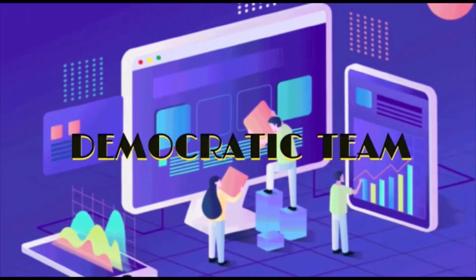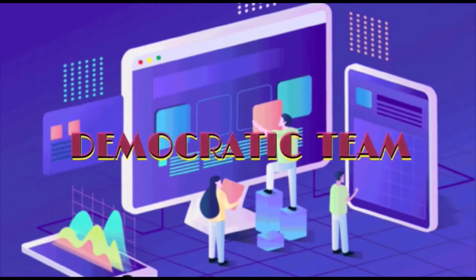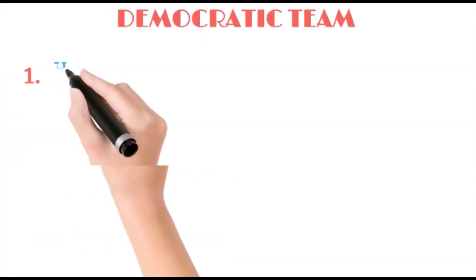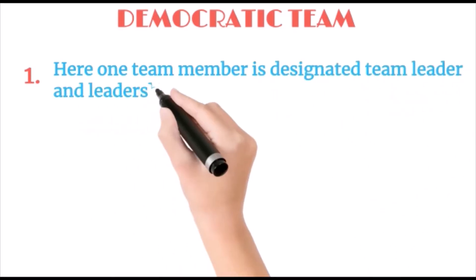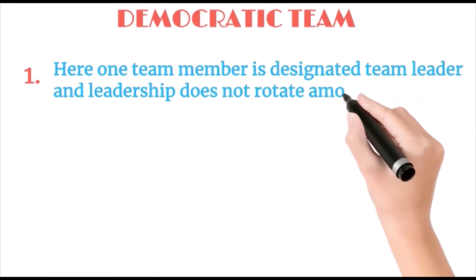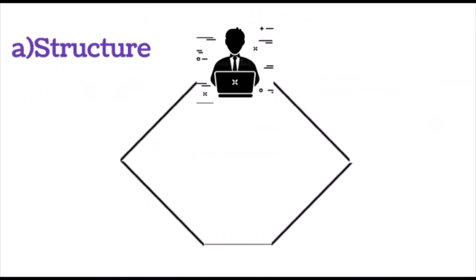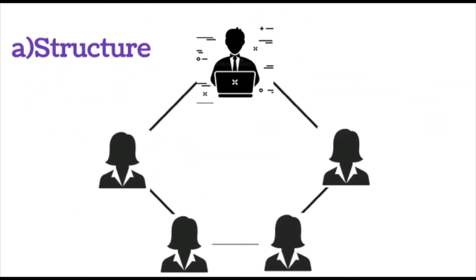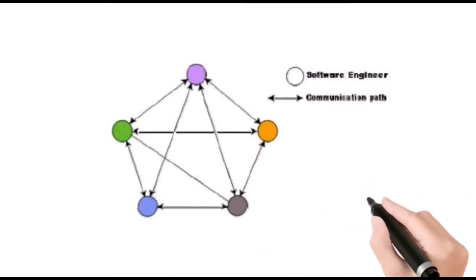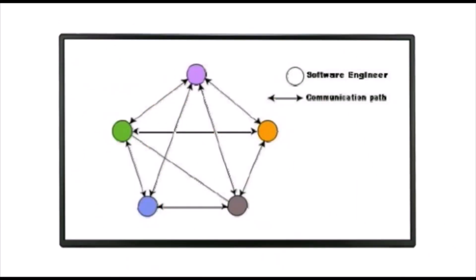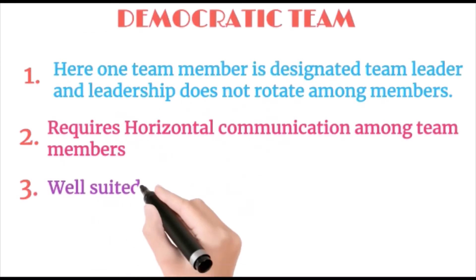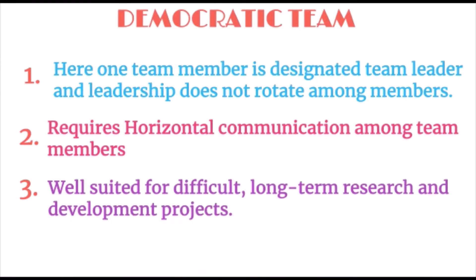Second comes democratic team. Here one team member is designated team leader and leadership does not rotate among members. The structure has many employees working under a leader. Team leader requires horizontal communication among team members. Well suited for difficult, long-term research and development projects.